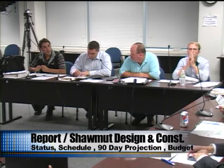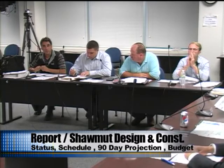Okay, understood. I did talk to them today. They said they had isolated about 2/3 of everything, and that they're pretty confident that 2/3 of it all is complete with what they've done so far. What they have left to do is go into the kitchen now and check every line in the kitchen. However, some of the lines in the kitchen had already been damaged from freezing pipes, and they were repiped and surface mounted before we got there.